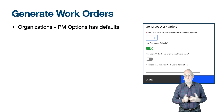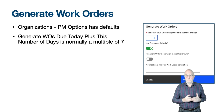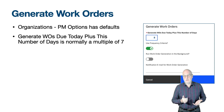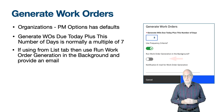To generate work orders for next week, set the look-ahead value to 7. For the next month, set it to 28 or 30. There is no setting to generate all work orders due in the next calendar month because the number of days fluctuates. It is common to use values of 7, 14, or a multiple of 7. The generate work orders action also works from the list tab against a selected set of PMs.